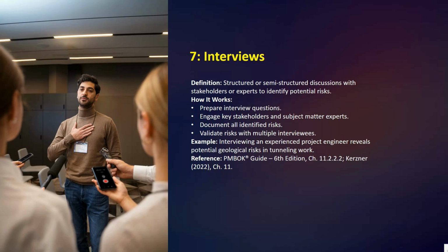Okay, so using this technique, you will prepare structured or semi-structured questions and engage in conversation with the key stakeholders or individuals who have valuable knowledge about the project. So this can reveal personal concerns, unspoken challenges, or you can say deep insights that are crucial for a comprehensive list. Okay, so here we have the example: interviewing an experienced product engineer reveals potential geological risk in tunneling work.